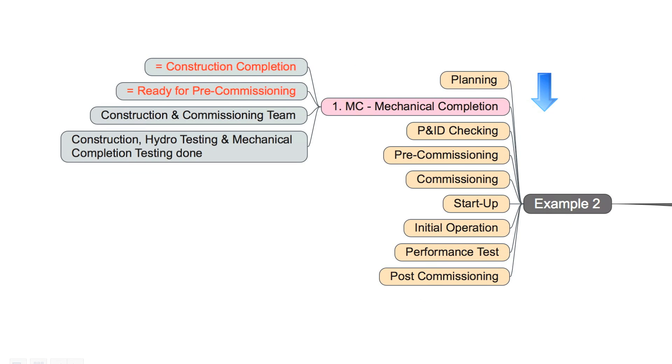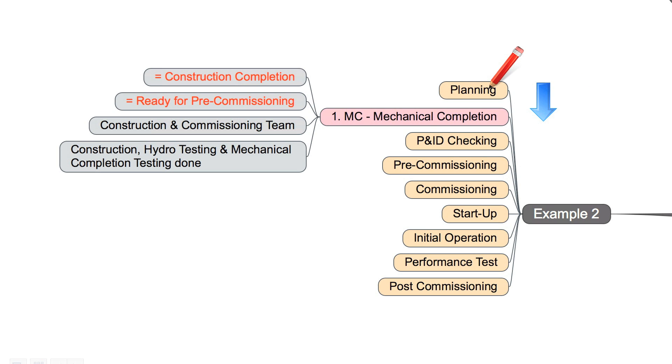It starts as well with planning. Then we have the mechanical completion milestone, P&ID checking, pre-commissioning, commissioning, startup, initial operation, performance test, post-commissioning. But here mechanical completion means it's the same like construction completion, and this is the same like ready for pre-commissioning. The construction and commissioning team is normally involved in this task. And in detail it means construction done, hydro testing done,